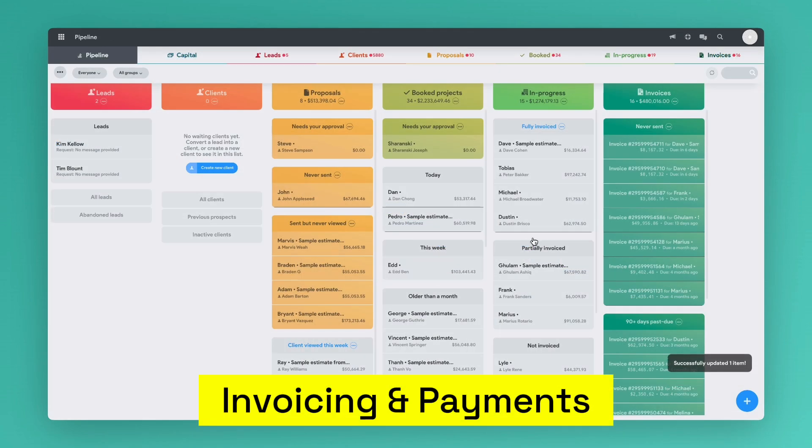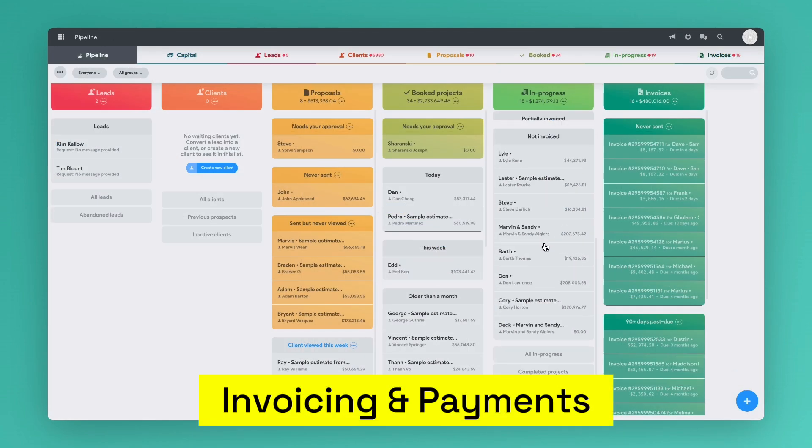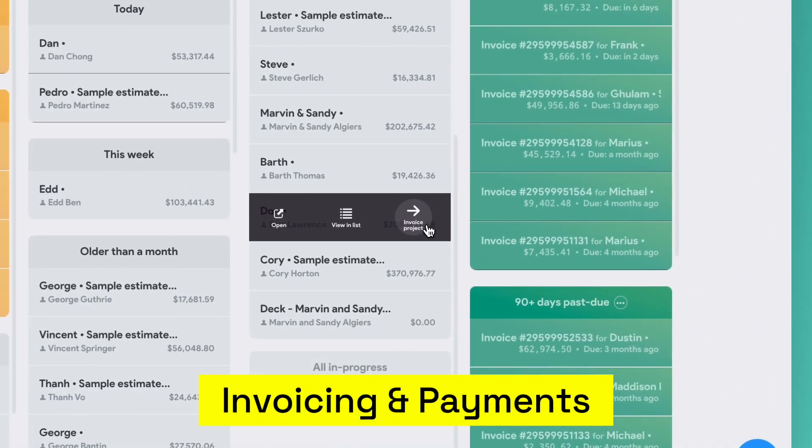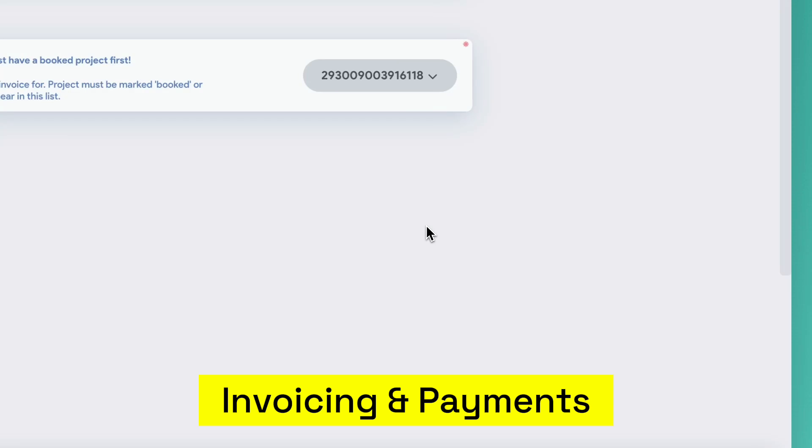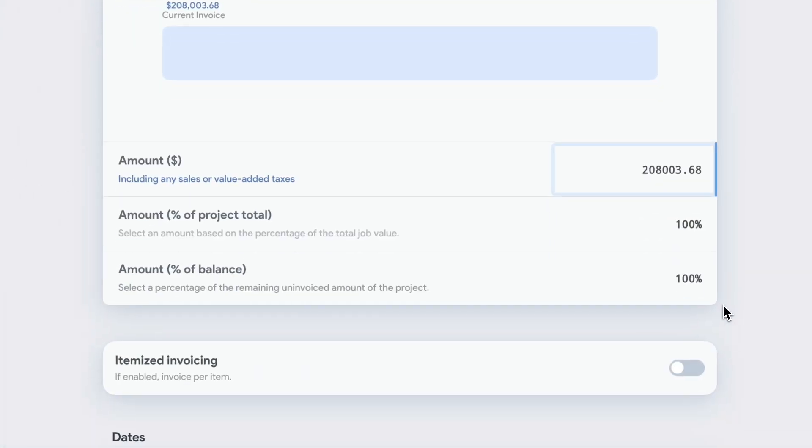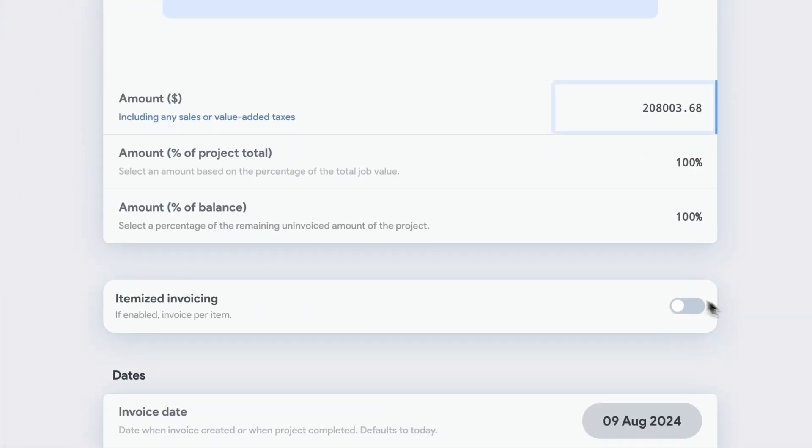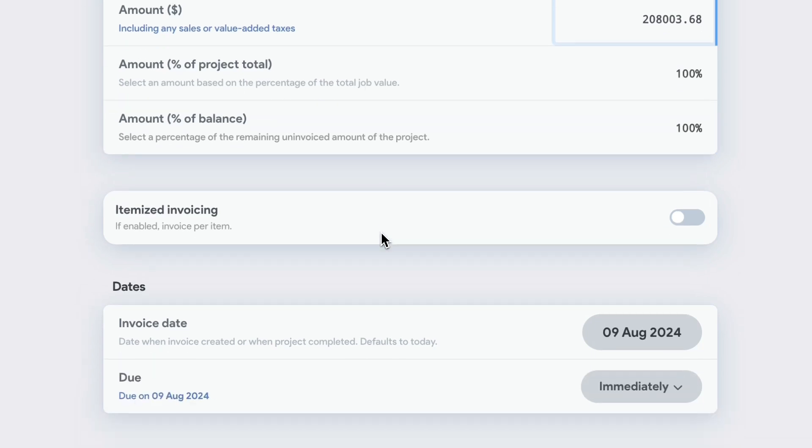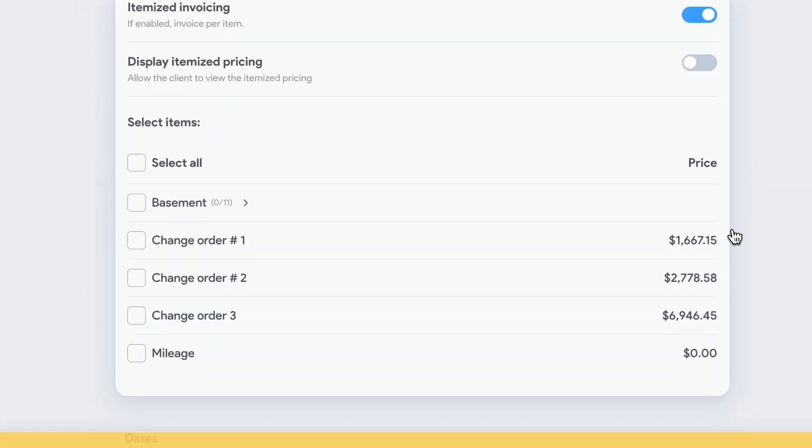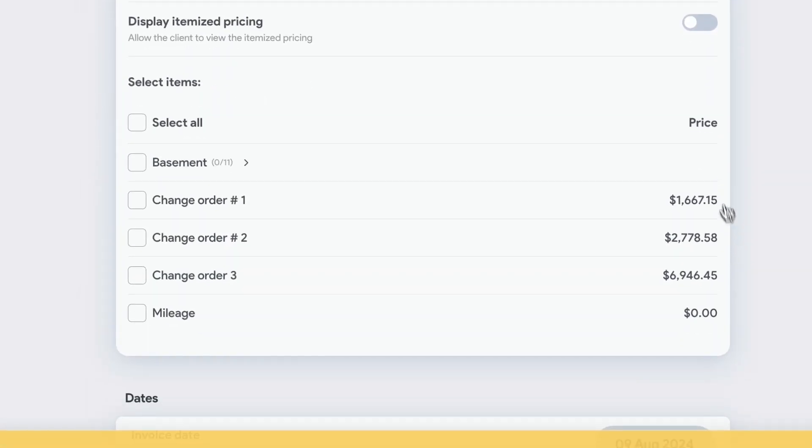When a project is completed or partially completed, you can hover over it and select invoice project. From here, you can invoice by dollar or percentage amount of the project or use itemized invoicing to select items or change orders to bill the customer.